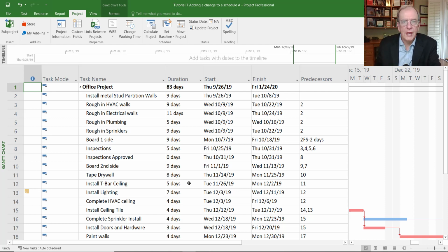And that might involve weekends and overtime work, and that would change the cost of the change as well. So if you're contemplating it, then you could develop different scenarios and determine, all right, well, we're going to have to work weekends and do this, the X, Y, Z, and this is what it's going to cost, get the client to sign off on it, and then you can move forward with it. At least you're being very transparent and you're understanding the impacts of what's going on.